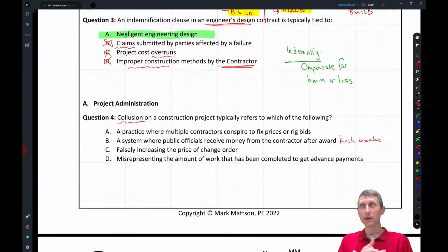pipe one way, but the owner was supposed to get a right of way through the property. And what ended up happening was there was a lien on the property, and we had to move the pipe. So we moved it, and we actually had the same exact linear footage of pipe. The only difference was we had to tunnel under a road. I called a local contractor that did the tunneling, and the contractor said, okay, $5,000. It's a small pipe, nothing, $5,000. We got a change order, guess for how much? Not $10,000, not $20,000, not $40,000. We got a change order request for $80,000.